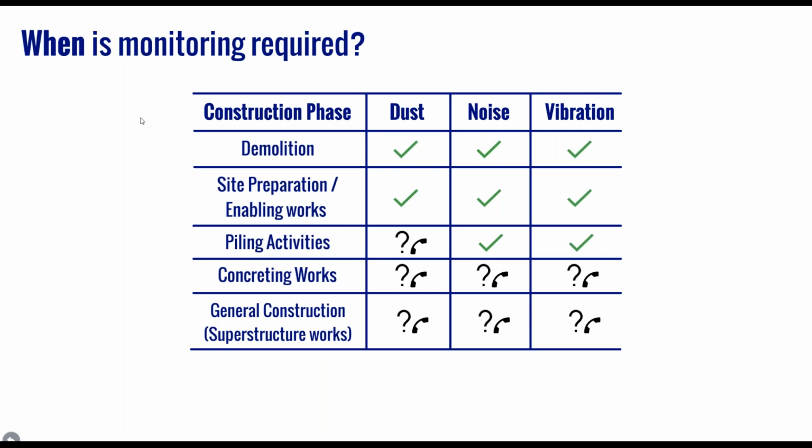So throughout all the phases and these stages, it may be possible to negotiate early removal of any monitoring equipment with a local authority. This will likely be dependent on 3 things. Firstly, the local attitudes to the works. Secondly, whether or not there have been any validated complaints during the previous work phases. And finally, how the local authority perceives the contractor operating the site.